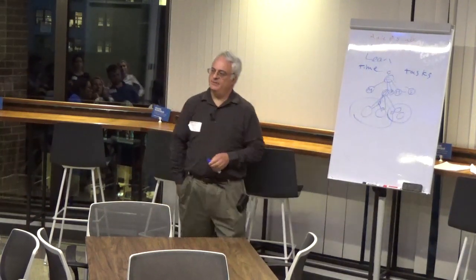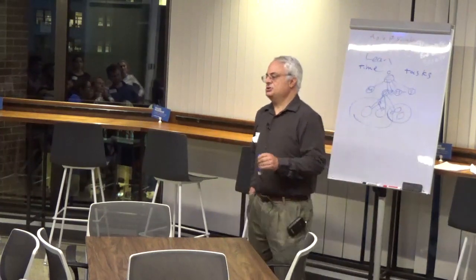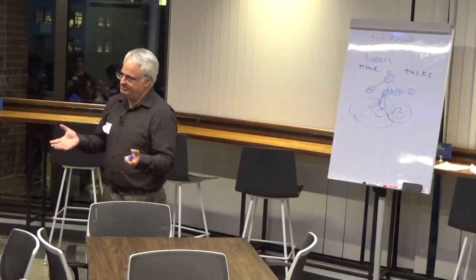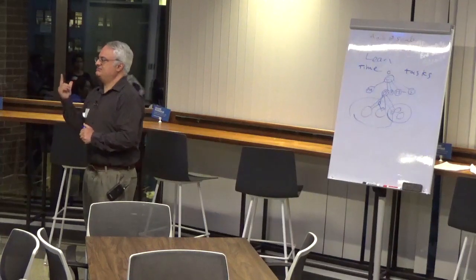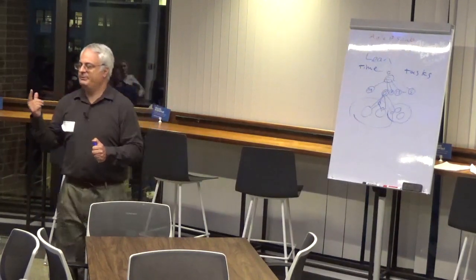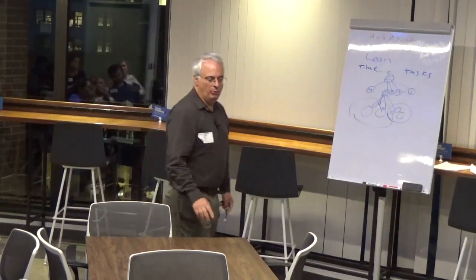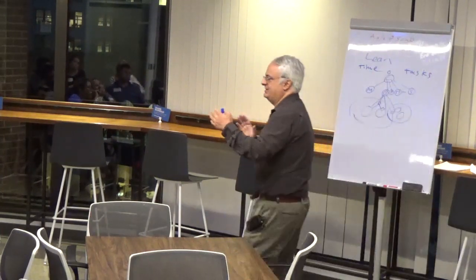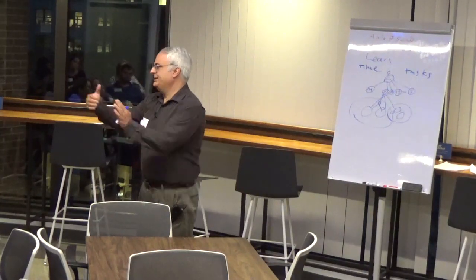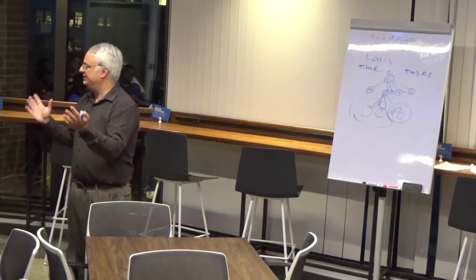There's also a lot of other problems that you didn't even bring up there, which is sort of hinted at that. Which is, if people use like Scrum, which is the most popular one, so I'll use that. And that's what I was working at my last company. And there's something called story points, which is supposed to be inside your team to kind of calculate your velocity, how fast you're going. Well, all of a sudden the CEO gets wind of this and says, that's something with time-based. Let me just do estimates based on story points. That doesn't work in 100 different ways. Well, two major ones. One is that the teams estimate differently. The other one is, the goal behind story points is not to estimate them until you get close to doing them, right? Because you don't know how much work it's going to be. Because you might develop part of it in another thing you're working on. But the other team might develop an API you can now use. There are a lot of things going on here.